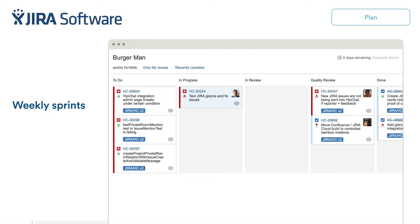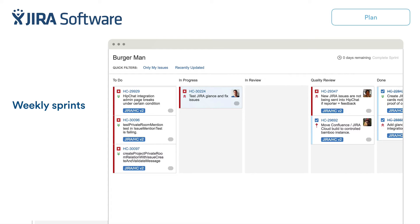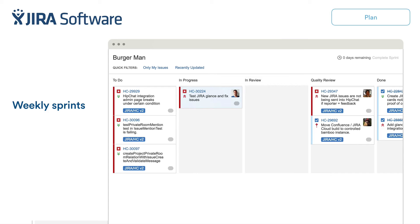After the planning meeting, we break out and developers then go through the backlog and pick issues which will help them achieve the objectives discussed in the planning meeting. So instead of discussing individual tickets during the planning meeting, we discuss objectives. And then each team member goes and picks from the backlog what will help them achieve these objectives. What we gain from that is first buy-in from everyone in the team. So everyone is involved in defining what's in the sprint and how they basically are going to achieve the goals that they agreed on taking on. Two is because of weekly sprints, we can easily measure velocity and see how we're progressing.